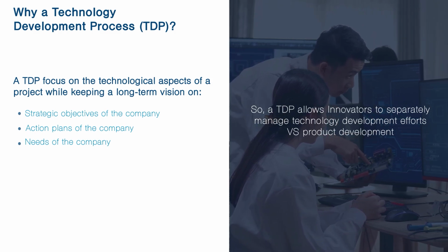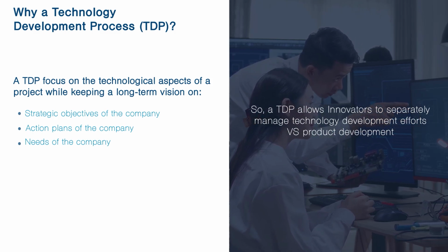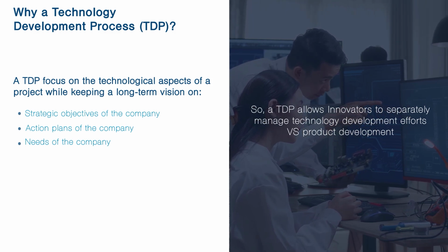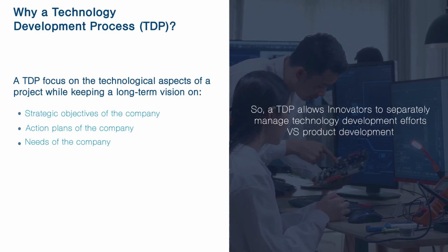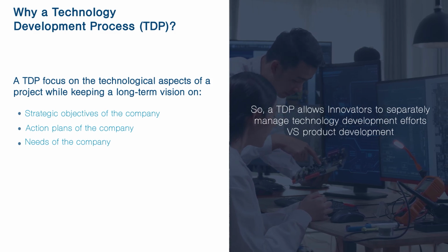That being said, integrating technology that hasn't had time to mature or sufficiently develop is a common mistake. A team needs time to debug the technology while also adequately developing the product. If the product hasn't been given this much needed time, it can lead to additional delays or a premature launch, causing customer dissatisfaction. A good technology development process is performed upstream of the product development process, thus during the front end of innovation. The technology development process is initiated the same way as a product development process.